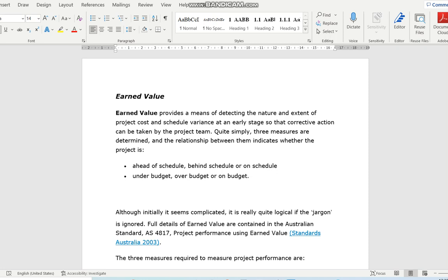And your EV minus your PV, you will get your schedule variance, okay? Then we also have another formula, the schedule variance, the SV. So earned value analysis is tying all these things together, tying the two S-curves together with time and cost. In fact, with cost, if we look at the budgeted cost of the work scheduled, we also have our PV, and the budgeted cost of the work performed, you will get your EV. The technique is the same, okay?